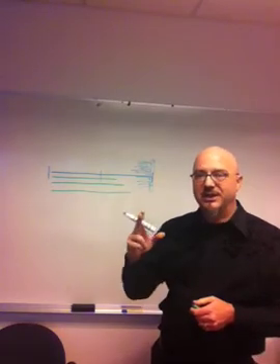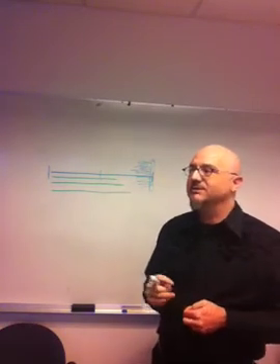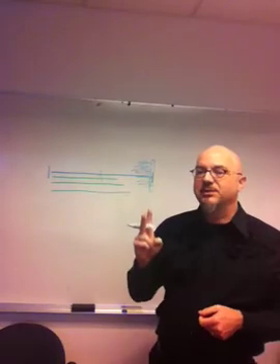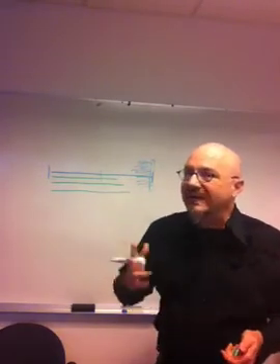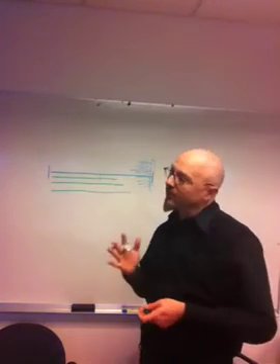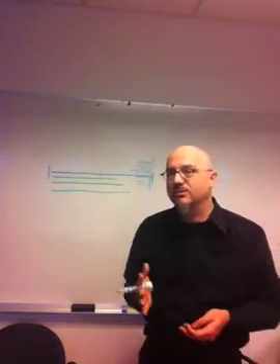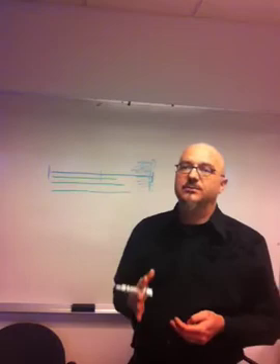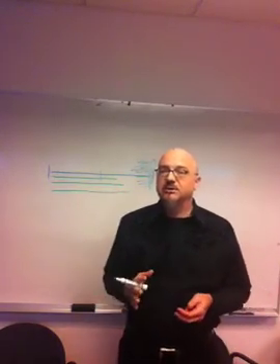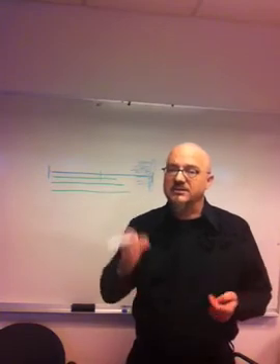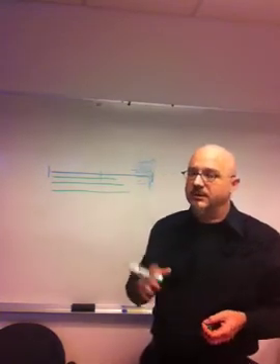Now, I want to change that definition, and I want to say it should be completed by one developer in half a sprint or less. I might even say in a quarter of a sprint, depending on how you work on your stories. If your stories tend to be assigned to one developer, then that one developer does all the work. I would say it should be a quarter of a sprint or less. Not too much less. And here's why.